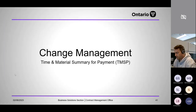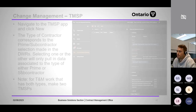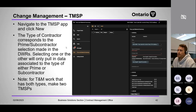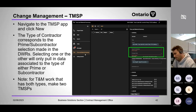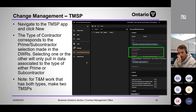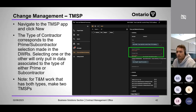Moving on to the Time and Material Summary for Payment — the TMSP. Navigate to the TMSP app, click New. You have the type of contractor again — prime or sub — related to what you indicated on each DWR. You also have the change order field, but not the CR field: DWRs can be linked to CRs or change orders, but only change orders can have TMSPs. A TMSP is essentially the price agreement for a change order — it comes in at the end to substitute and become the final price of the change.